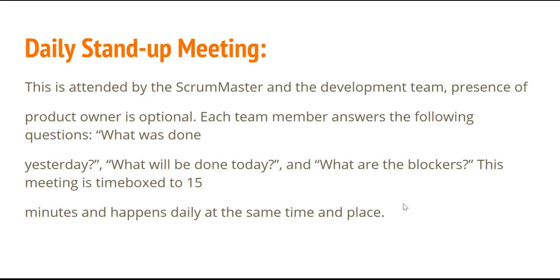The next meeting that we have is the daily stand-up meeting. The daily stand-up meeting is attended by the Scrum Master and the development team. Here, the presence of the product owner is optional. In daily stand-up meetings, each team member answers the following questions: what was done yesterday, what will be done today, and what are the blockers. As a best practice, it is advised to wrap up the daily stand-up meeting within 15 minutes.